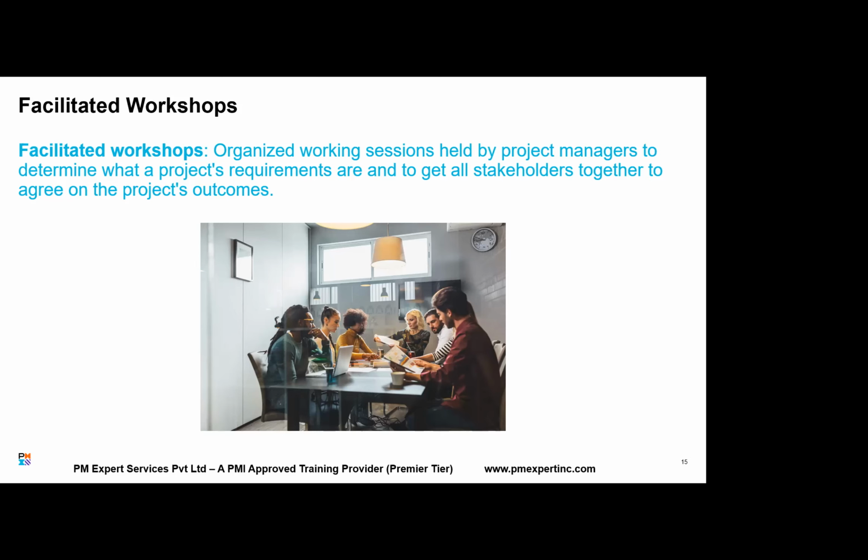For example, the system might have 10 features. Which are the top 5 requirements that we have to consider in the project? For this, we need people arriving at a consensus, so we use a facilitated workshop. The outcome of a facilitated workshop will always be a consensus, unlike a focus group where the outcome will be a variety of opinions. So is the difference clear between facilitated workshop and focus groups?